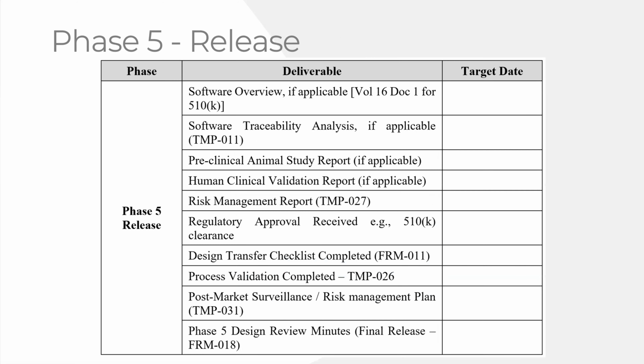Now, this is the final phase. After we've done the V&V testing, now it's time to actually submit to the FDA. These first 4 items could be in the previous phase, because after you've done all your software testing, you're going to fill in these 2 documents. You could create them in phase 5, or you could instead say, no, we're going to put them in phase 4 because we want to submit to the FDA as soon as we finish all our